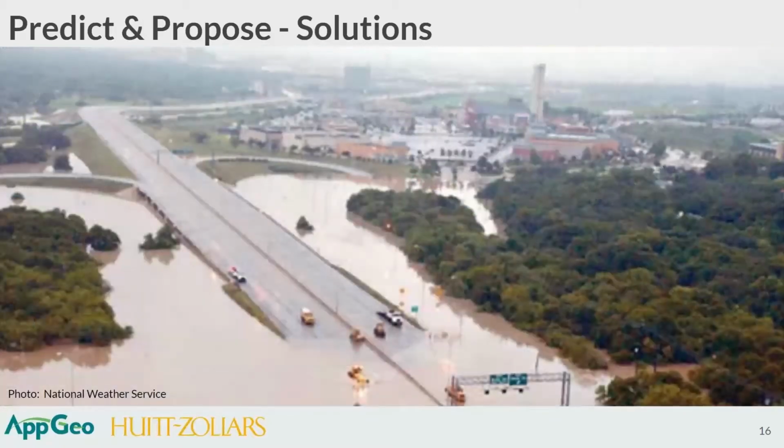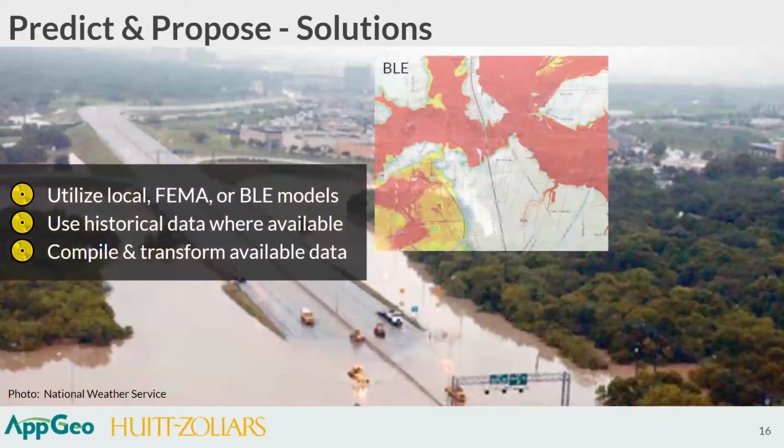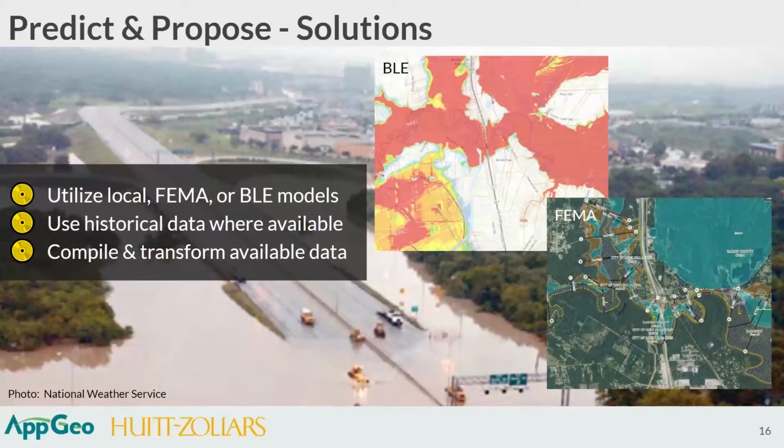Additional solutions on the data side, within the targeted outreach program, where we've gathered all this data and we understand what we do have and what we don't have. And then we're going to need to cooperate to collect new data in the region where that's feasible, or we might have to fill in missing data using historical sources. But we recommend a single environment in which all of the geospatial data and models can be transformed into compatible formats and open standards to facilitate region-wide analysis.